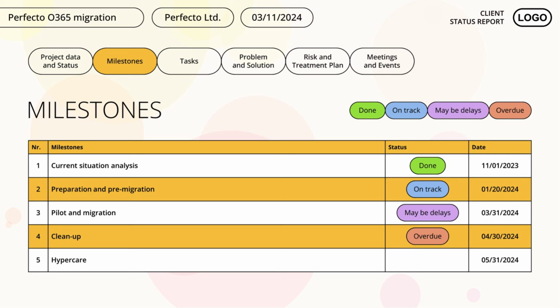Overdue. This refers to an existing deadline delay. With this status, you need to explain the reason for the delay. This may be a sentence that is repeated from week to week, but always say it. The cause of the delay can be on the client side or on ours. In both cases, talk about the treatment method and its status.